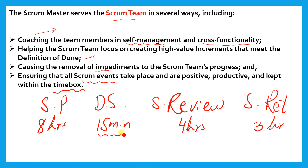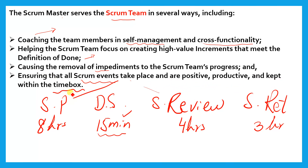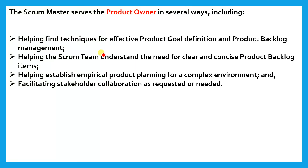If the sprint is for two weeks, these time boxes are less, but the daily Scrum remains 15 minutes regardless. Scrum Master ensures all Scrum events take place, that they are formal, and that they are positive, productive, and kept within the time box. The Scrum Master is responsible for this.